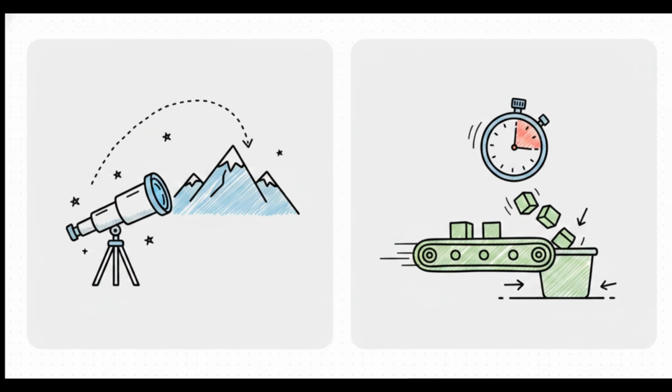Now, we really need to pause and understand the difference between velocity and throughput. It is absolutely vital not to mix these two up. Velocity predicts your future capacity for planning based on your team's historical consistency. Throughput, though, simply measures the raw average number of items your team is actually completing per unit of time right now. Think of it like this. Velocity is all about planning for tomorrow. Throughput is about evaluating your real-time productivity and finding constraints today.